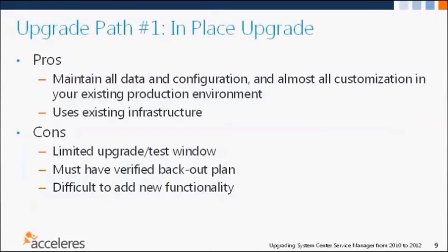And the last bullet there, which is really related to the first bullet in the cons, is that it's difficult to add new functionality, partly because you only have so much time to add new things in over a weekend, but also because users will need to be trained on the new functionality. There needs to be awareness and readiness of these new features. And that's difficult to do when folks go home on Friday and come in Monday with a new system. It is possible to train in a lab environment, and we've done that, and that works well to get people ready. So there's some things you can do to get around that fact, but it does make it a bit more difficult to get new functionality in at cutover.